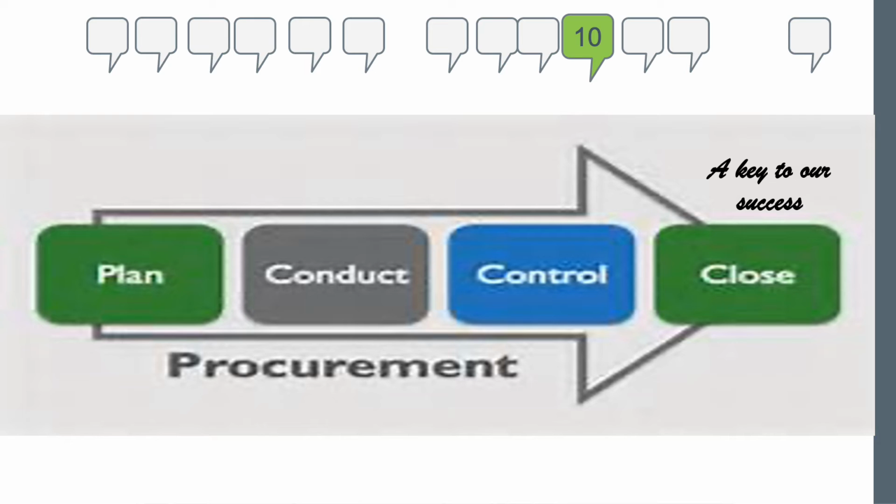We as the project team will oversee that. Purchasing will be the ones to actually go out there and find that. We will come up with statements of work or items of interest or whatever is required in order for purchasing to put out a tender or some sort of request in order to get us the appropriate contracted service that we need in order to achieve the goals of the project.